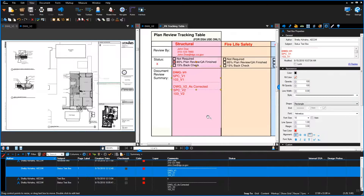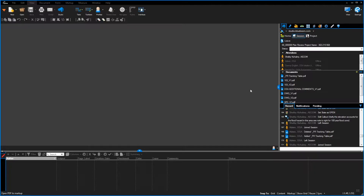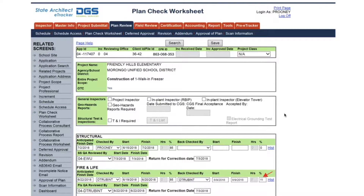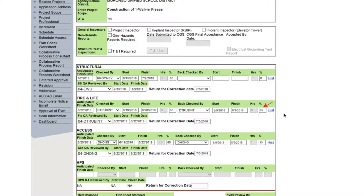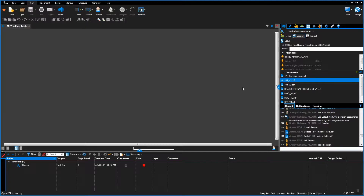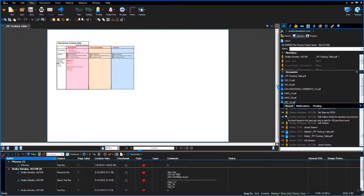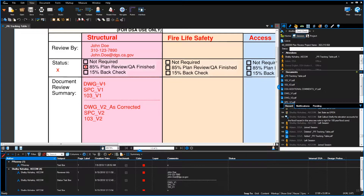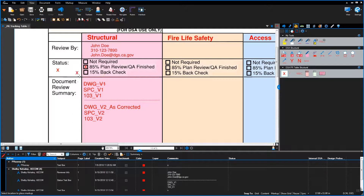If documents are not code compliant, the design professional can make the required changes within the Bluebeam Studio Session and the plan review will continue until code compliance is achieved. If code compliance cannot be achieved using Bluebeam markup tools, then corrections will be made out of the session and the design professional will be required to resubmit the drawing. If code compliance cannot be achieved during the over-the-counter appointment, then an in-person back check shall be scheduled per 1806 Section 3. If plans are code compliant, for the non-lead plan reviewer, the plan reviewer will update eTracker plan check worksheet back check to 15% and notify the lead plan reviewer.